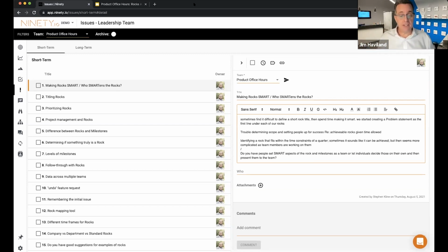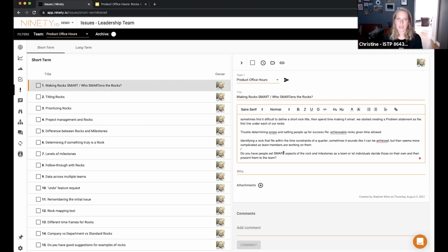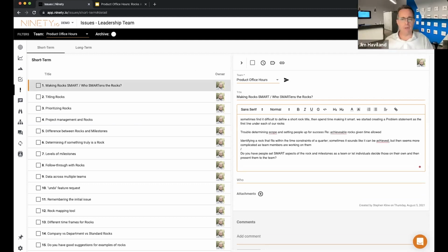And Christine, I say you do this as well. As we're talking about it, I'm typing notes in the description the entire time. Just keep typing everything that people bring up, because you don't want those thoughts to go away. And then I will force them to give me five things that we have to get done towards getting this rock done, just to create that thought process of creating your milestones.